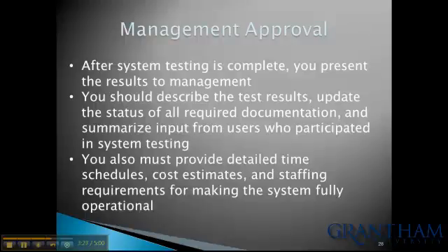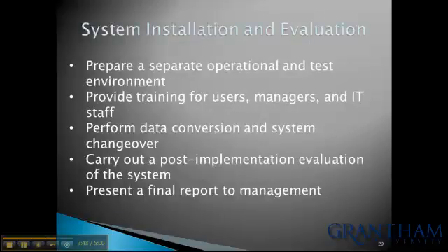After system testing is complete, you present the results to management. You should describe the test results, update the status of all required documentation, and summarize input from the users who participated in system testing. You also must provide detailed time schedules, cost estimates, and staffing requirements for making the system fully operational.